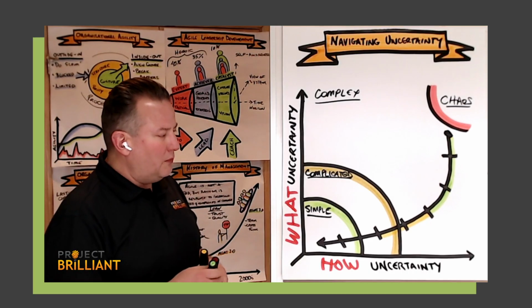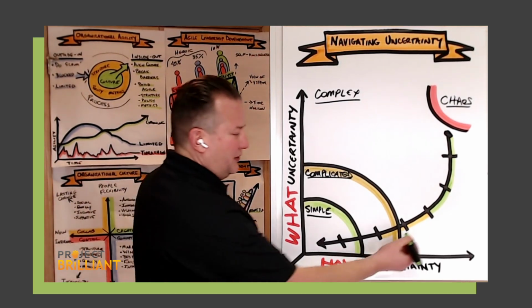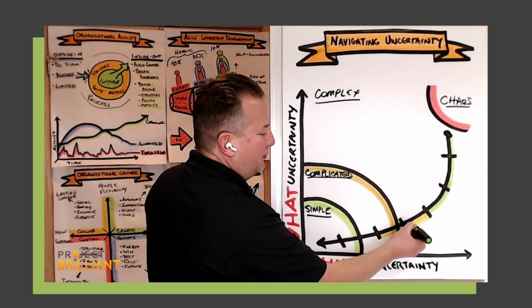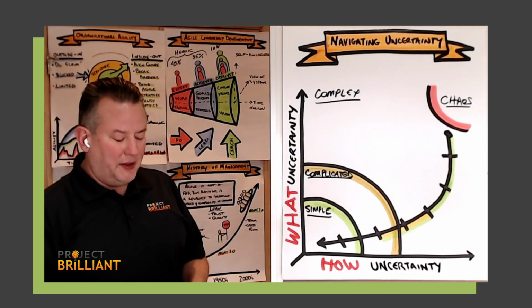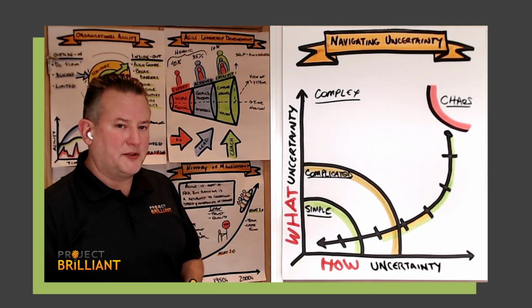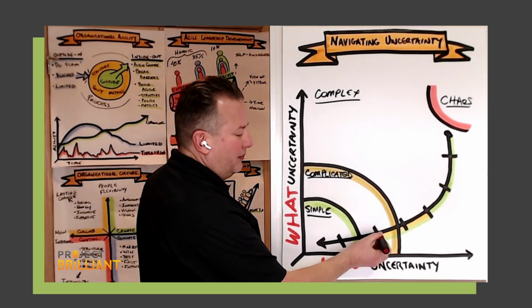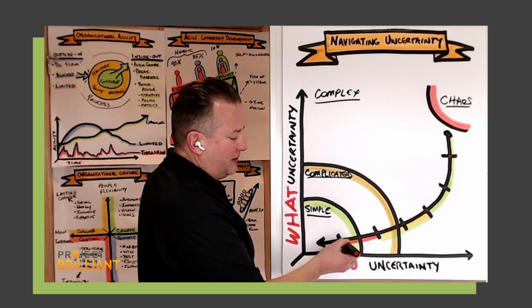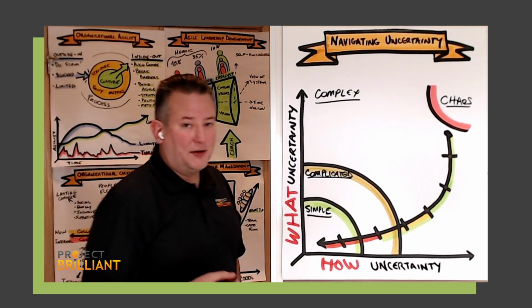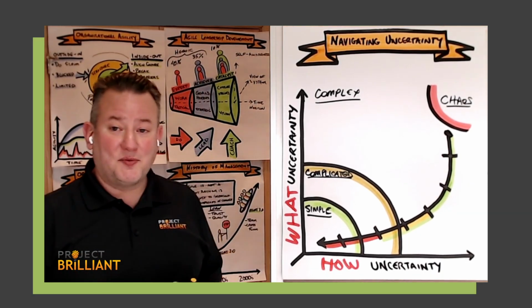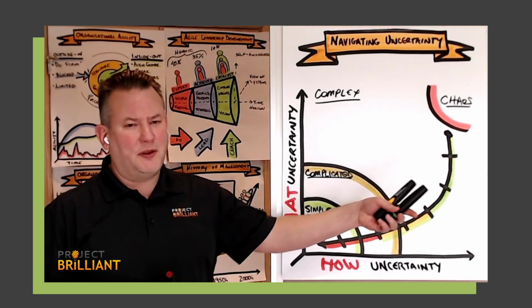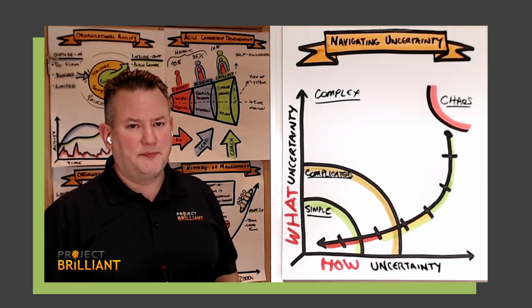And so what we're doing then is pretending that this yellow project is green, and we're oftentimes pretending it's just a technicality. So we pretend it's green even though it's yellow. And then the unfortunate thing is, by the time we get towards the end, when it's too late to do anything about it, we realize the project is actually red in that we're behind schedule, over budget, or maybe both, right? And so oftentimes we call these watermelon projects, green on the outside, but if we look closely, they're bright red on the inside, right?